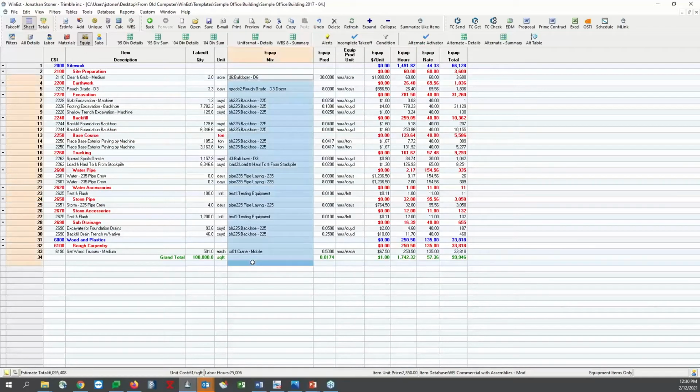I've got a piece of equipment here, and I've got productivity that I'm getting out of the equipment. Of course, I want to have waste factors and things like that in there, because I do have non-productive time with equipment for sure. So you could put equipment factors and labor factors in to make sure that you're covered, because trying to match your equipment time with your labor time is a waste of money.